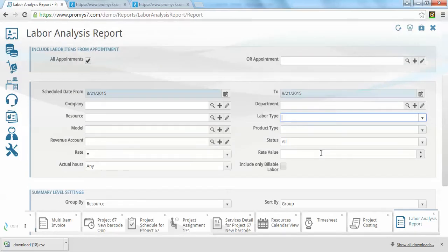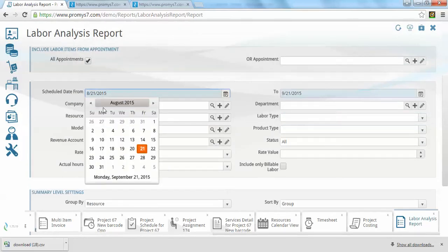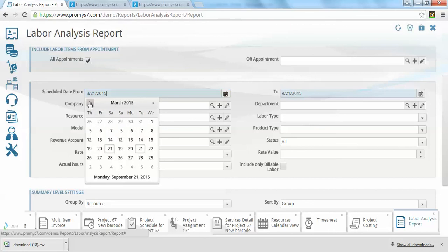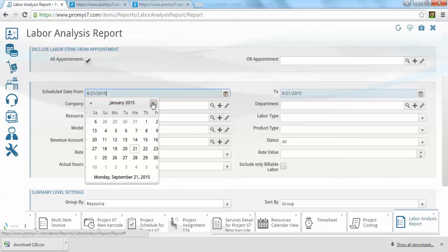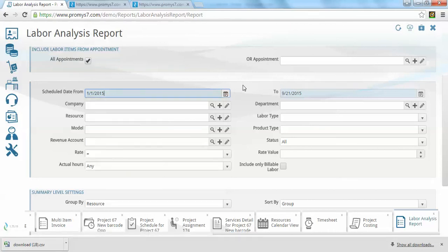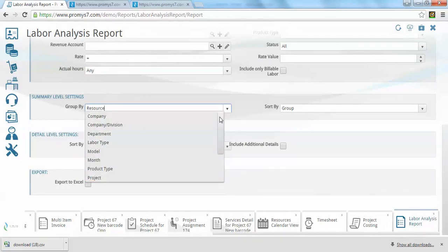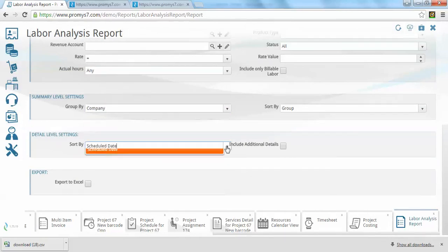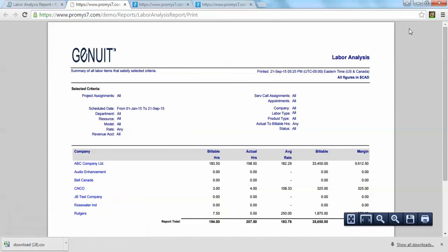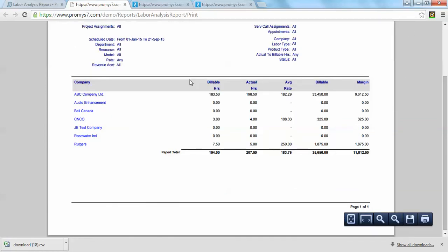Right, so I'll give you a good example. We're trying to run an audit for year to date to see if we have some customers where their actual hours consistently exceed their billable hours. So, in short, maybe I need to fire some customers. And so what I'm looking for is particular customers who are always in excess of their actual hours versus their billable hours. Now, chances are I may not have a problem across this entire customer. So here's a good customer example, right? Actual hours consistently exceed billable hours across all the projects for that date range that I put in.